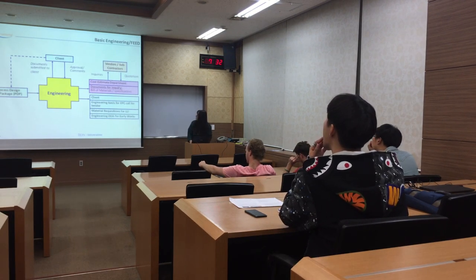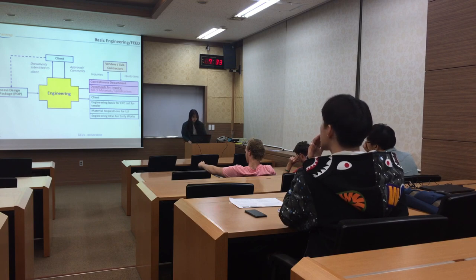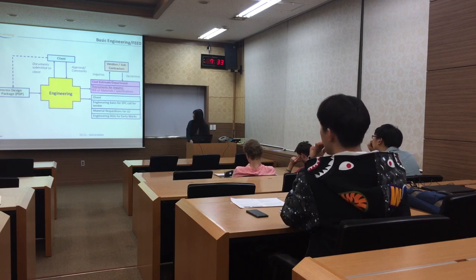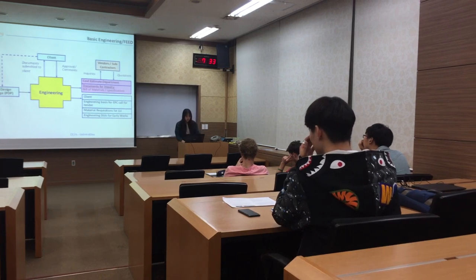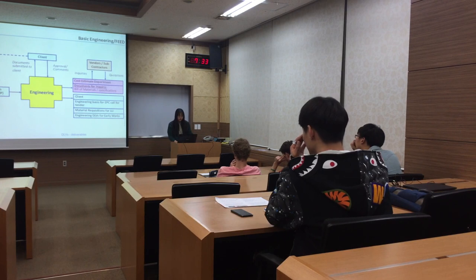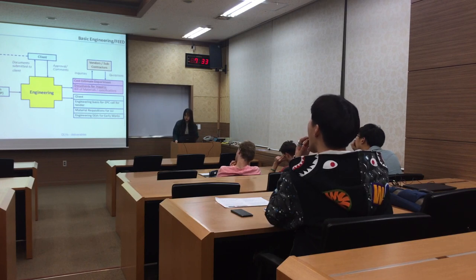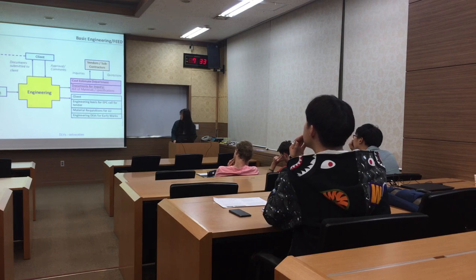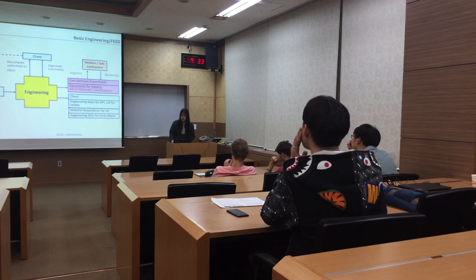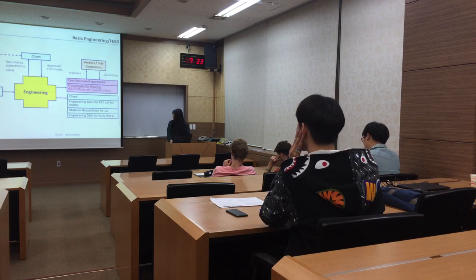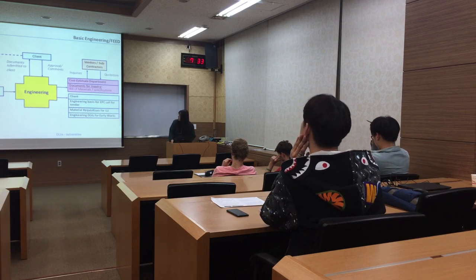So here's about cost estimate departments. They communicate with vendors and subcontractors with the bill of materials and specifications. If we require something from vendors or subcontractors, like making some components or assembling some specific parts, then vendors and subcontractors give us the quotations.